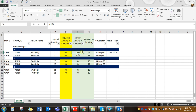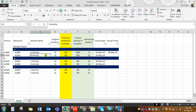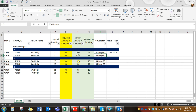Afterwards I have updated the activities — Activity A was zero percent the previous week, and the current percentage is 100%, so this activity is finished. That means we need the actual start date and actual finish date. Activity B is at 10% progress, meaning it is in progress and should have an actual start. Similarly, I have two further activities with different percentages and actual start dates.